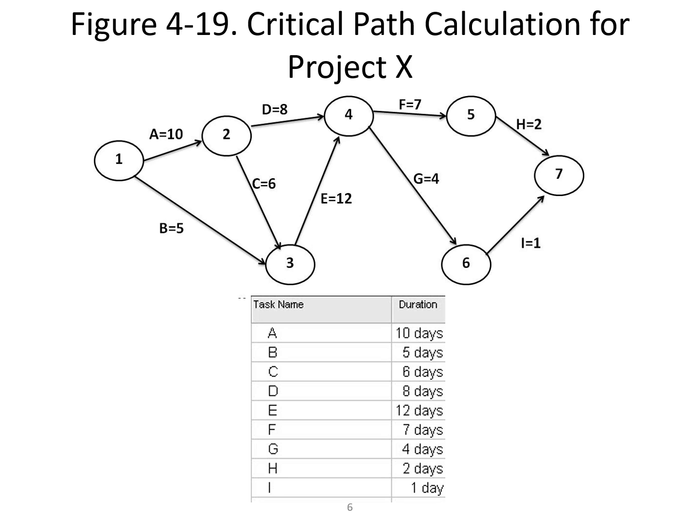As you can see, each one of the activities is listed in the critical path method with the added information of the dependencies. You will see that activity H depends on activity F's completion. Activity F depends on activity D's completion, and activity D depends on activity A's completion. All of the paths work this way.